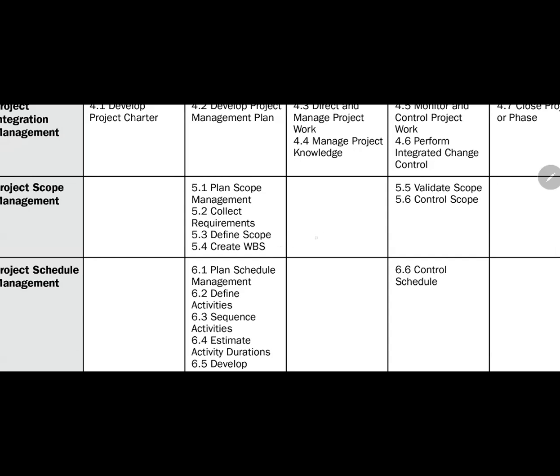So that is it. Scope baseline has three elements: scope statement, work breakdown structure, and work breakdown structure dictionary. Those are the three key elements of the baseline. Did we see it in the last lectures? I'm sure we saw that. It's revision.